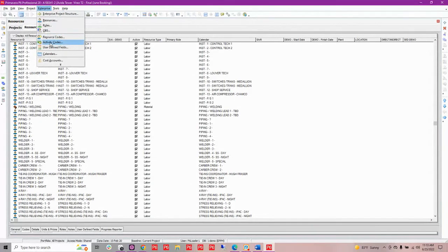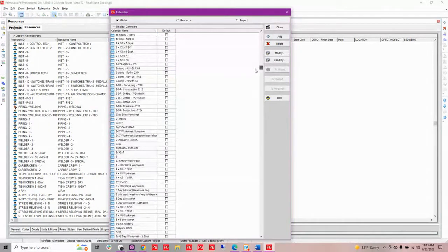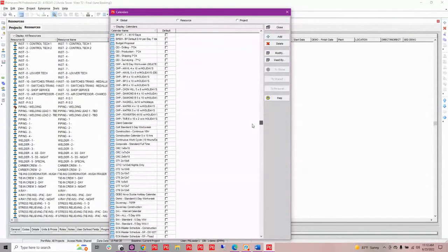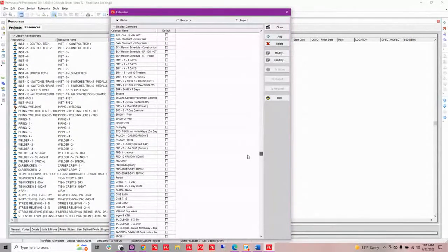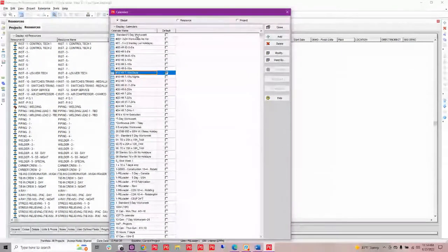Another thing that we find is that we have calendars that come in. So many calendars have been imported in at the global level, depending on the project that they're in. Now, these aren't calendars that are necessarily going to be used by everyone in our database. And one thing I like to point out up here is that even though this one has a space in it, this again is a standard 5-day work week, which is delivered with P6.